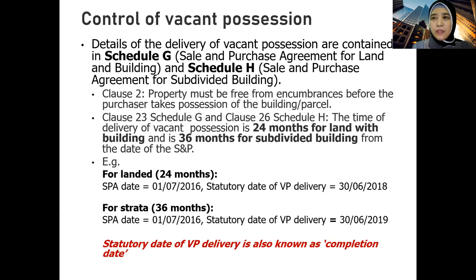Now the control. We are talking about the provisions under the HDA which are related to vacant possession. Details of the delivery of vacant possession are contained in Schedule G and Schedule H. You may remember that Schedule G and Schedule H are the standard sale and purchase agreements that are contained at the back of the Housing Development Act. Schedule G is the SPA, sale and purchase agreement, for land and building, for landed residential properties. Schedule H is the SPA for subdivided building, for strata residence. So G and H come together, kan? G dulu baru H. So G refers to the sale and purchase agreement for landed properties. Schedule H is the sale and purchase agreement, SPA, for subdivided building or strata properties.